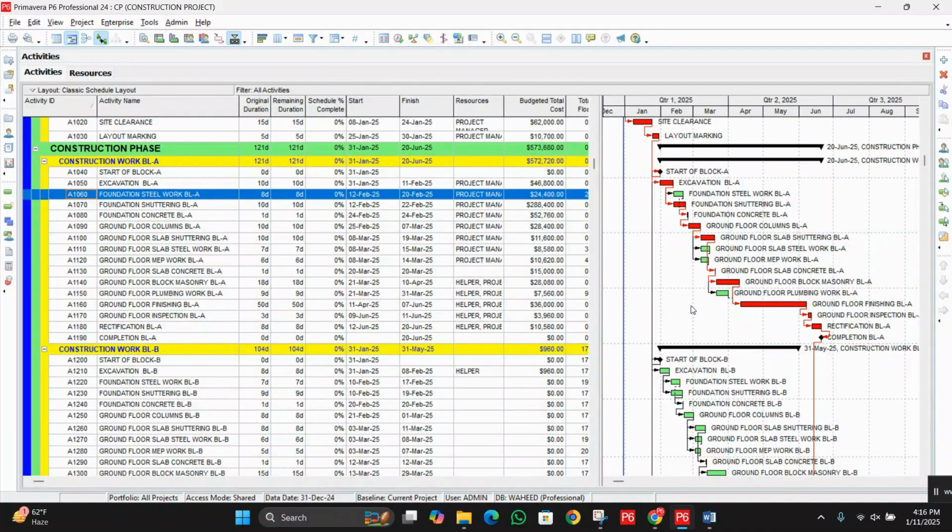It enables batch modification to activities, resources, or custom fields using logical expressions, such as adjusting duration, recalculating cost, or updating status. With its ability to define criteria, specify updates, preview results, and apply changes, global change is highly efficient for managing complex schedules or large projects.